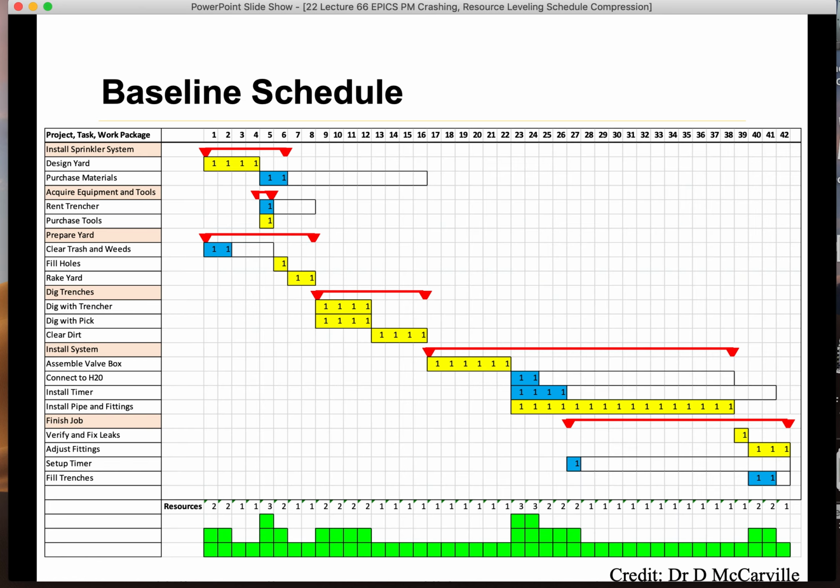I just pulled out the Excel spreadsheet and laid out the activities and the masters nicely. You see these ones are not really activities, they are what we call masters. They are kind of a title, grouping things together to keep them neat and tidy, so they don't have durations associated with them.